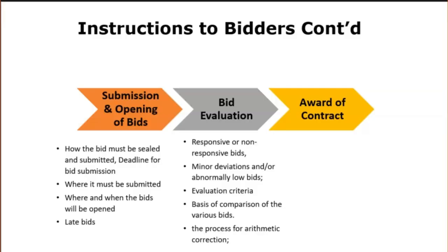If you come to section F, here it talks about award of contract. This subsection stipulates the basis for award, either by lowest evaluated bid or most advantageous bid, with reference to section 3. It also stipulates the process for issue of notification of award letter,